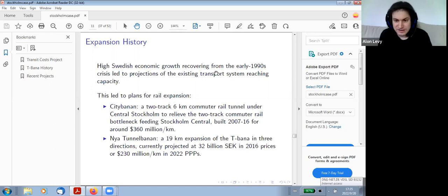I mean, it's not 3.6 thousand per rider because that just does not exist. It's, I think, 28, maybe in 2 days when it will be almost 30,000. 30,000 looks high, but it looks high mostly if you compare it to the dollars of 10 years ago. I mean, lines are being built currently with good benefit cost analyses elsewhere for approximately that cost per rider.